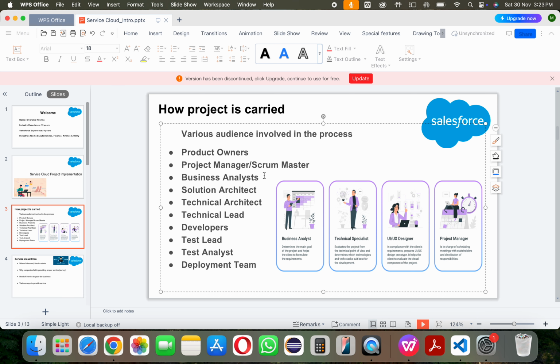In Agile, we call them stories. Let me give an example. Suppose the product owners are telling requirements, and he's noting them down in a Word document that has come up to 10 pages. He cannot tell all 10 pages in one shot, right? So he will break each half page into one requirement, and create each half page into one story.